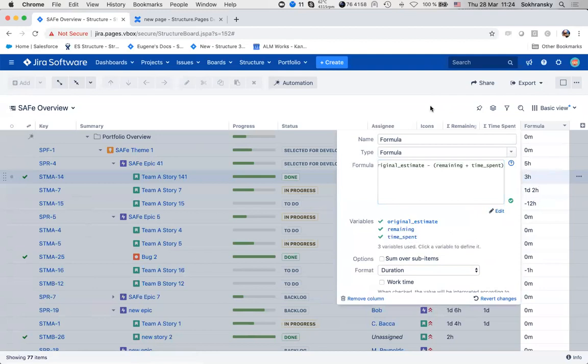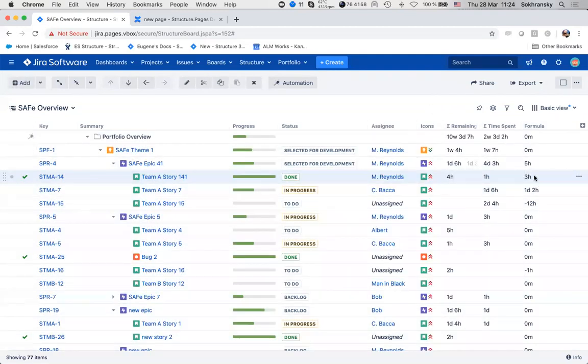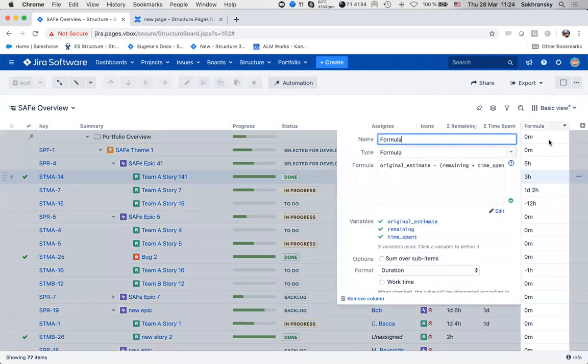So now we can see the numbers here, right? We have 3 hours left here, so we're fine, but we have minus 12 hours here. It means we are off. It can be useful and nice this way, but imagine we have a really large structure, too many numbers to just be looking at these little details. We want a higher level view. So we can easily, instead of the number, show maybe some indicator.